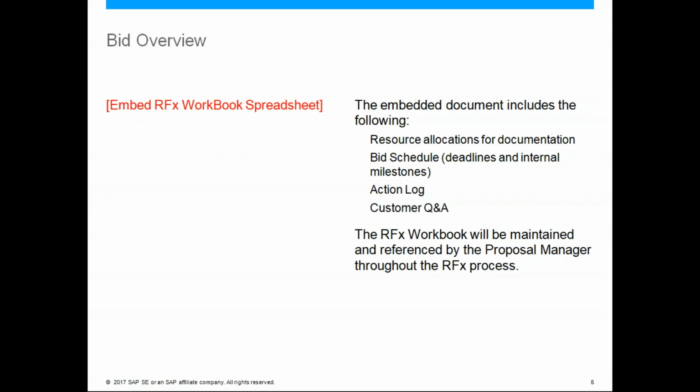Then you will have the configuration deadline here. I mean, by this deadline it should get over. Then by this deadline, your testing should get over. And in the testing, you should involve the TCS. So all these details, the team should mention, so that the client is clear, and in this case the consulting company is also clear.